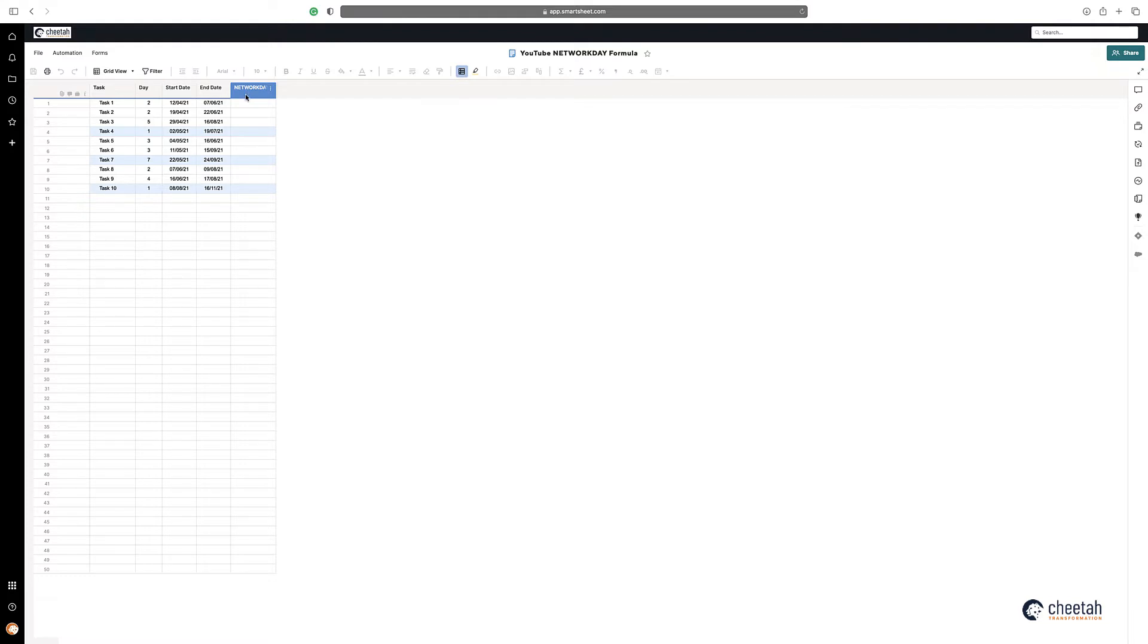So what NETWORKDAY does is it calculates the number of working days between two dates. However, should the start date happen on either a Saturday or a Sunday, then it will actually add a day on.